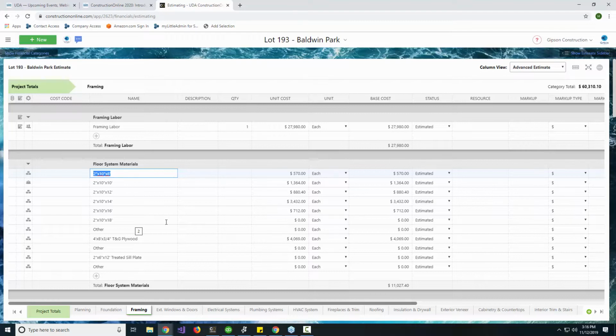Jordan and I really like to encourage people to use estimate templates. That way you have your list of possible items. You can go through and update the quantities, check to make sure the costs look good, but you're not going to forget anything. You can make sure that within each of these subcategories, you can list out the items that you might typically use and be able to use that in a really efficient way from a template perspective and go through and build out not only an estimate very quickly, but very accurately as well.